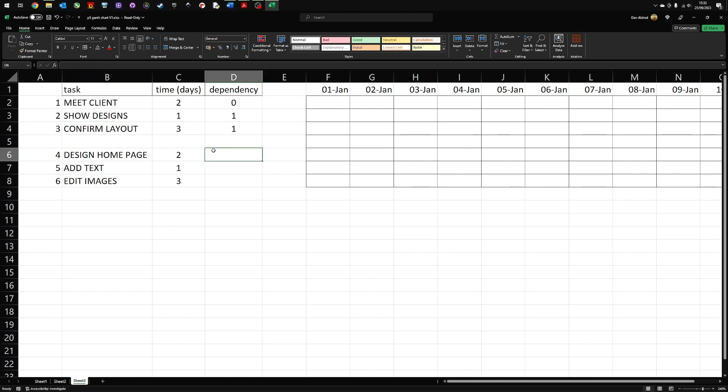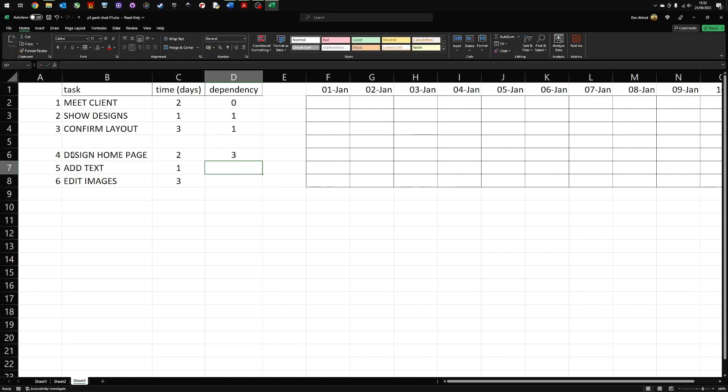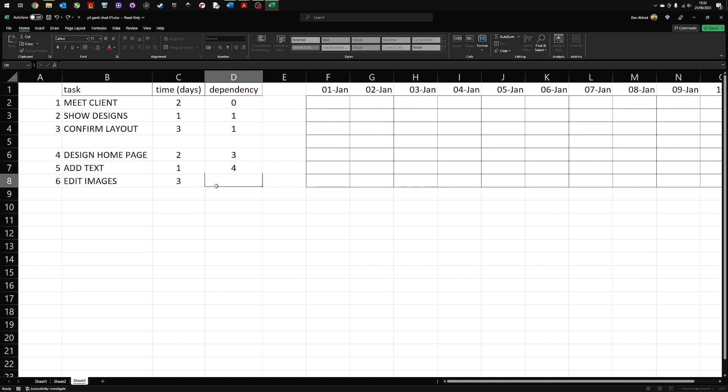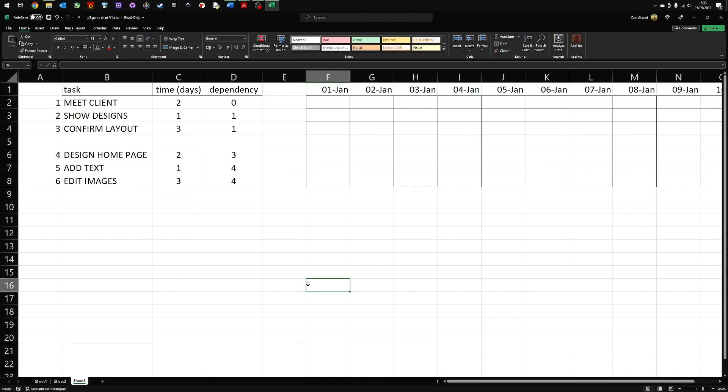Otherwise, I will be designing it without any idea of what it's supposed to look like. I can add the text once I've designed it. So that's four. You can also add the pictures, edit them once I've designed the homepage. And there we have the dependencies for these tasks. Basically, which tasks do I have to complete before I can move on to the next one? So I cannot design the homepage until I've confirmed the layout, which makes sense. You won't want to make a homepage without knowing whether or not the client wants that particular homepage.